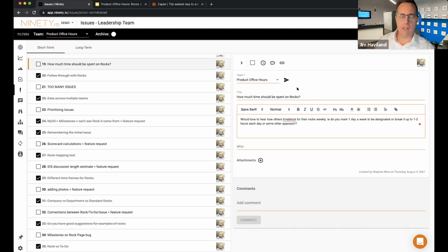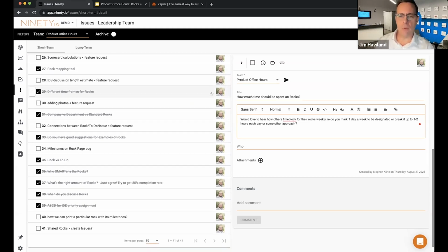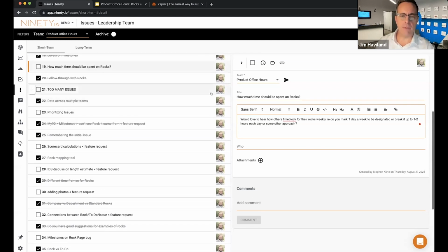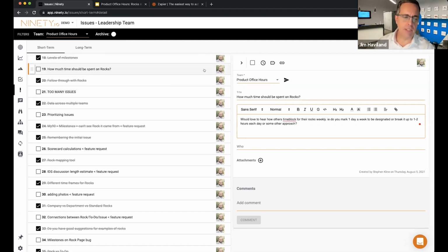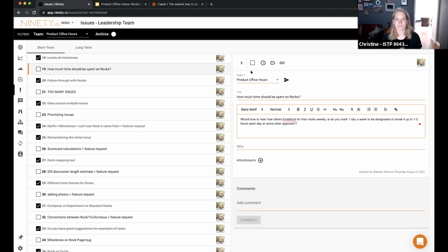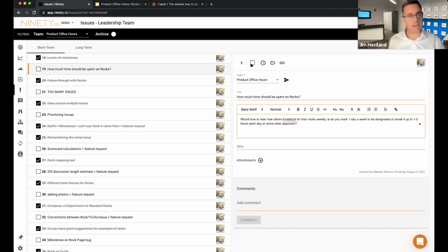A lot of our folks at 90 are fractional, so they have to be very disciplined with their time. Like my partner Chris, he does a lot of sessions, but he's also fractional with 90, and he sets days where he blocks out. He's got session days and he's got 90 days. So I do something similar where I go once a week and figure out I need this many blocks to work on this many rocks, and then I set it out. But that's a personal approach. Whatever works best for you, but 20% is about the benchmark.